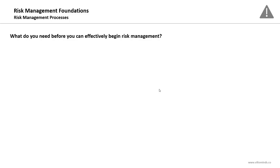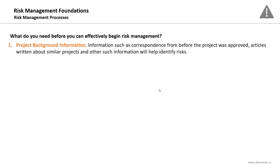There are ten artifacts — ten documents which you need to have before you kick off the risk management activities. Starting with the project background information: information such as correspondence from before the project was approved, articles written about similar projects, and other such information that will help you identify risks. Any information before the project charter was signed or the business case was approved will be useful as a risk identification tool.